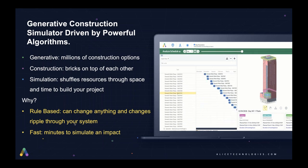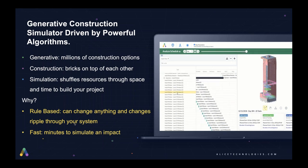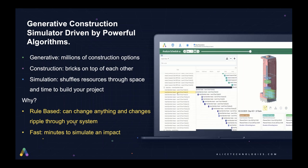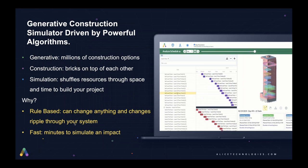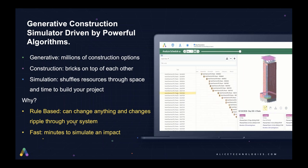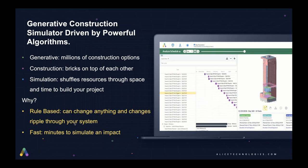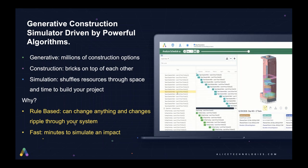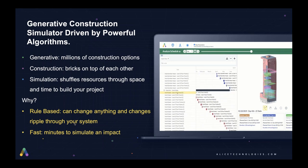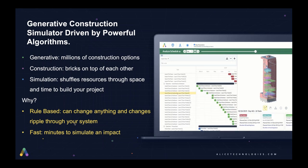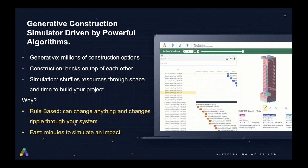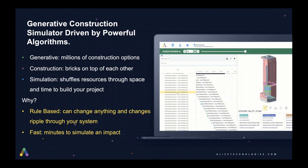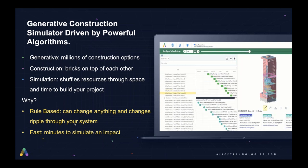So you no longer have to manually resequence activities. The simulation is doing this for you while automatically ensuring constraint resolution. So when you say that you need a crane, making sure that crane is available and there's not two crews waiting for the hook time. So why is this more important now than ever? First of all, it's rule-based. As construction schedules are having to shut down, adapt, and modify things, they know that these changes are rippling throughout their system. And it's really fast. Typically, these level of detail exercises could take you several months. With ALICE, you have the results in minutes.